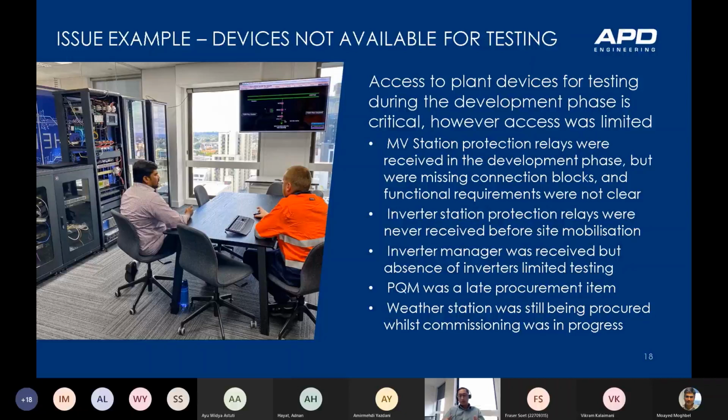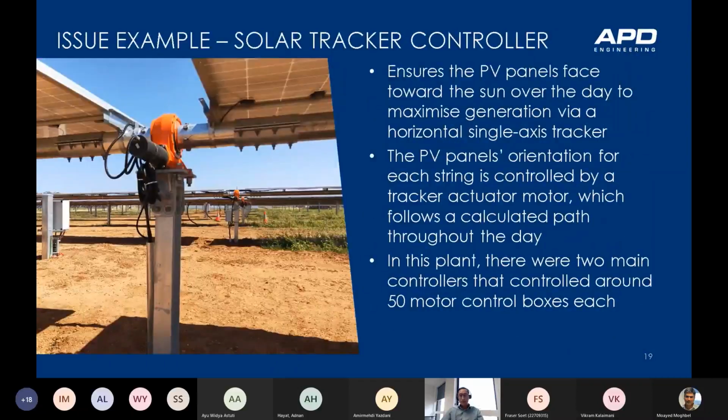On top of that, it was never a contractual requirement for the vendors to make equipment available for the functional or integration testing. So it was difficult to get some of these devices to the lab.